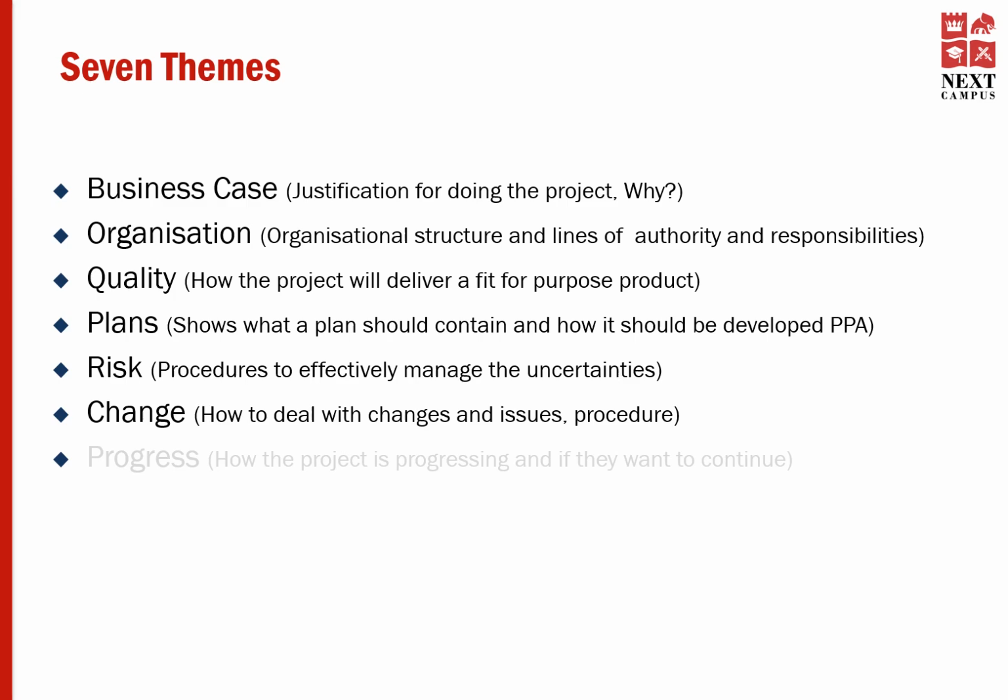All projects need a good issue and change management approach, from identification, assessment, and control of issues. Issues and change control happen during the full life cycle of the project. Remember, the objective is not to prevent changes, but to get the changes agreed upon and approved before they can take place.